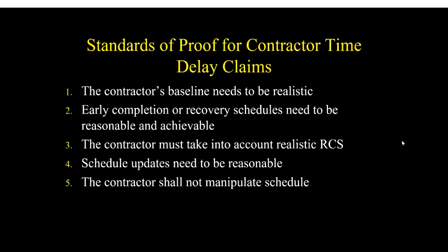Number three, the contractor must take into account realistic resource constraint scheduling. If the project involves critical and limited supply resources, those resources that are in limited supply and are make or break resources for the project, they must be taken into consideration during the scheduling of the activities.